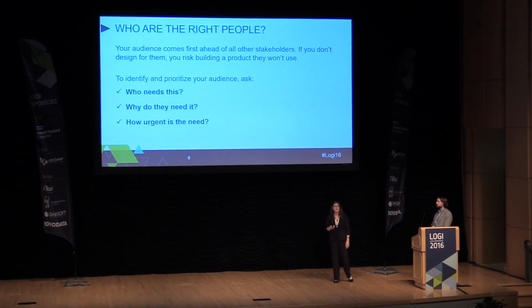I ask this because, let's take our enterprise BI initiative as an example. Maybe there are 9 departments in a company that need to come online to this solution ultimately, but the problem is urgent for 2 or 3 of them. Those are the ones where you're going to want to interview people. Maybe the others can be tabled for future phases.